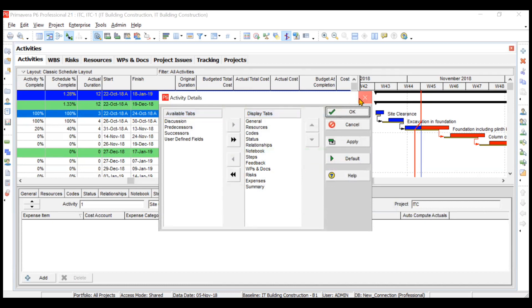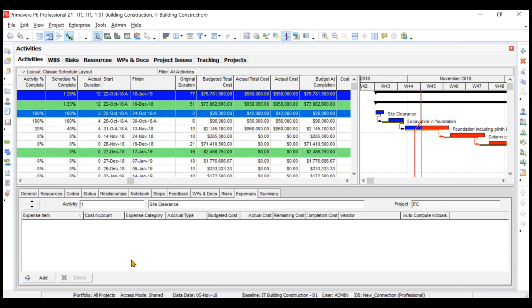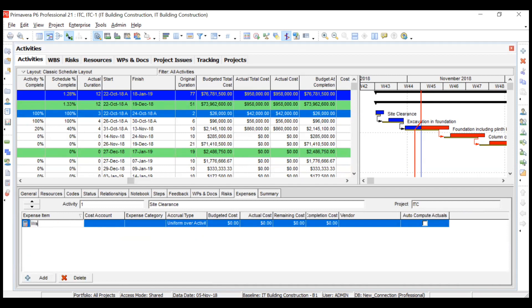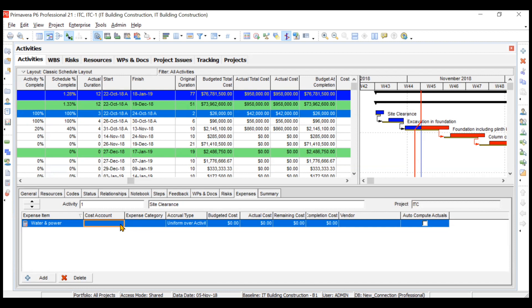Now you can add the expense. Let's say water and power is being consumed. You have to assign the cost account. Cost account is nothing but your cost codes at site. Several items get booked under predefined cost codes—like for water and power it will be IDC 005, for welfare expenses it will be IDC 007. You'll have to create these cost accounts.